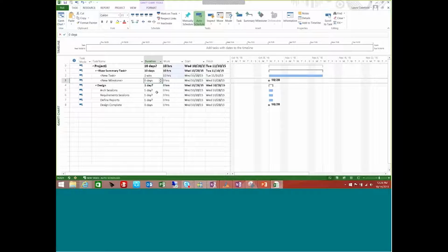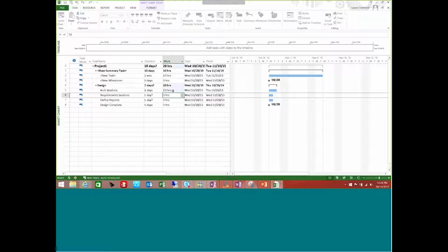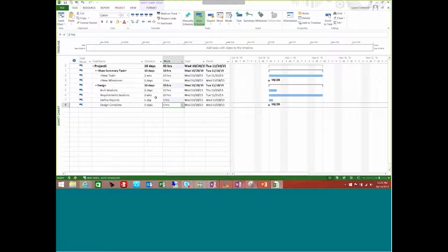So if I come in here and say 2 days for my architecture sessions, I could say, well, we're really only going to spend maybe 10 hours on that, all right? Requirement session, maybe 2 weeks. And maybe we'll spend 20 hours defining the requirements for this project. Reports 1 day, and maybe we'll spend 3 hours on that. Okay, so you get the idea here that you need to give it a valid duration and a valid work estimate.